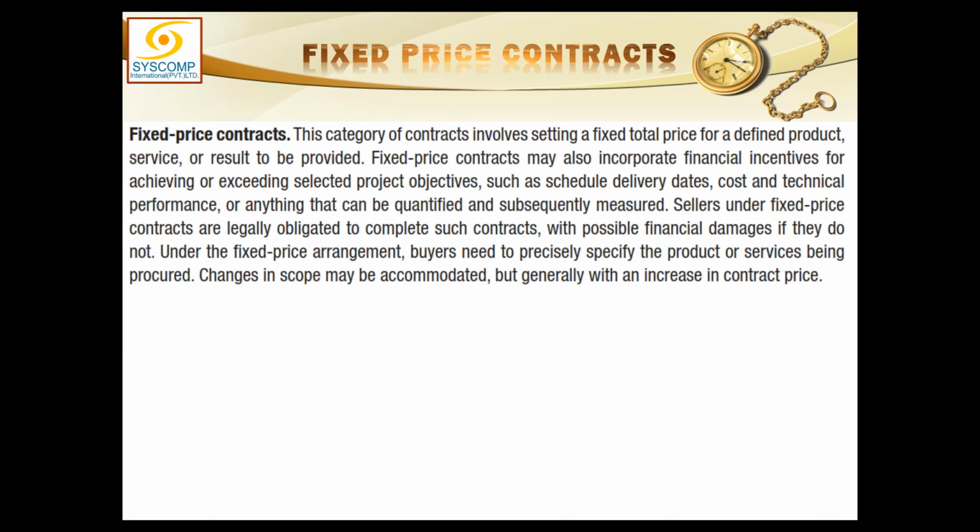You do not expect that any changes will come in the scope, and after the contract has been given, the scope should not be changed, because the lump sum figure we have agreed is for that job which we initially have explained to the contractor, and he has placed a bid for that.